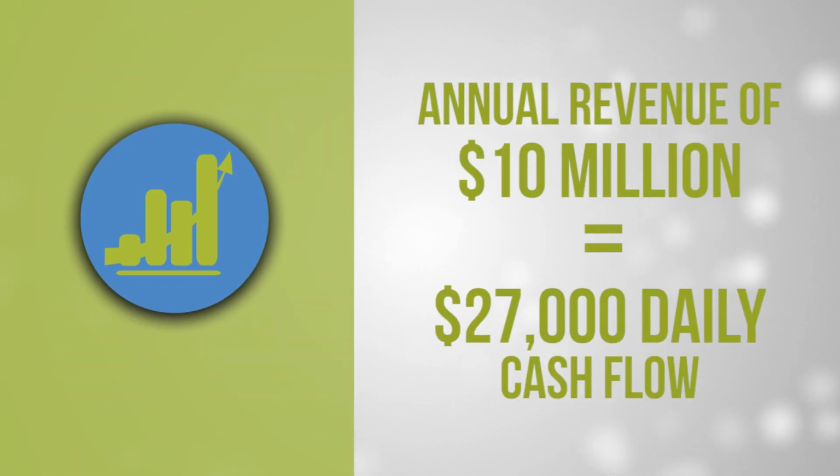The bottom line, and I know we used an example in one of our PM trainings, is that a $10 million business has about a $27,400 a day operating budget. For every day that you're not getting paid, that's the kind of money that you're missing out on, essentially, over time. So you're carrying a very heavy load in an organization that's not necessarily built to carry that type of financial load. It's huge.